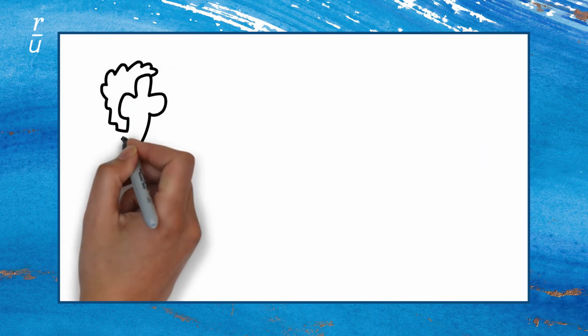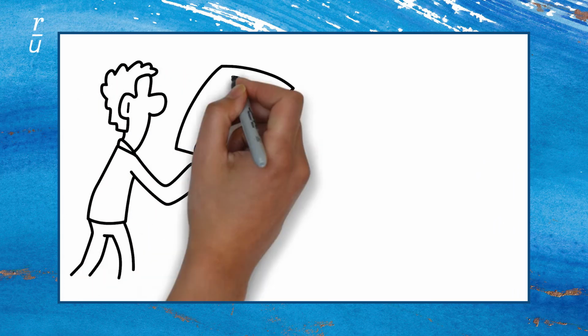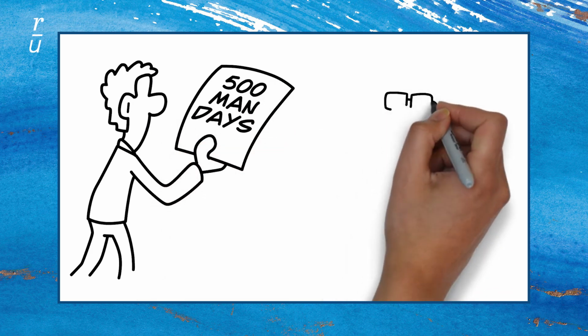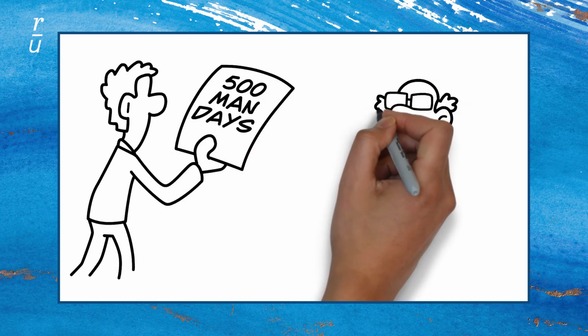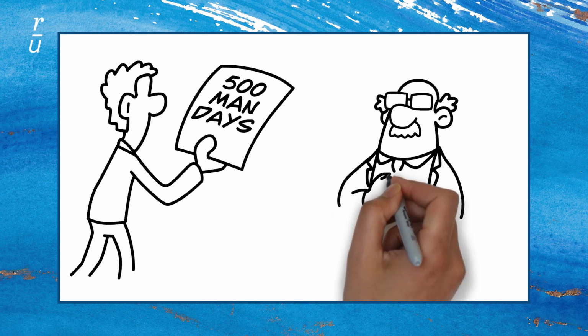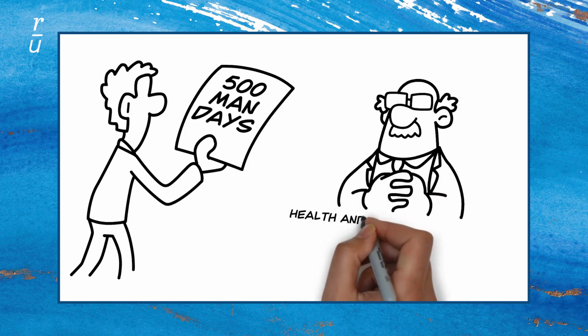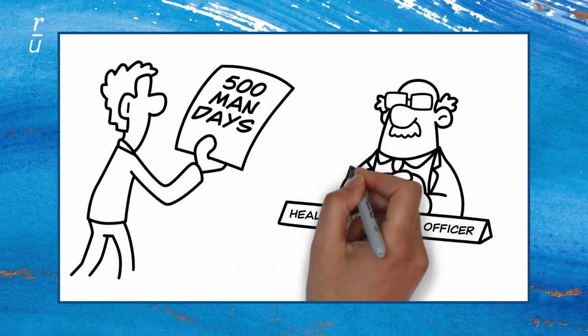CDM regulations normally kick in if your project will last more than 500 contractor days of construction work, in which case you need to notify the Health and Safety Office closest to your project. You must determine if CDM applies to you.